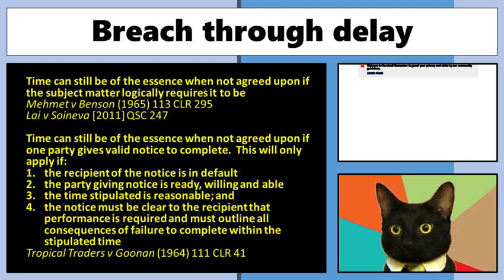And as such, that cost is going to be borne by the side who are being tardy, that are being slow. So just make note, you can do that at a point in time in a contract, as long as what you're doing is reasonable. You can't just turn up, put time is of the essence, and then 2 minutes later give notice. The courts will just ignore your notice. Your notice is going to be void in that situation.